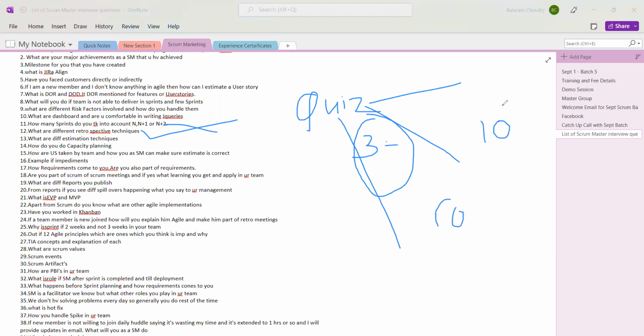The reason being, anything that happens, what did not go well, what went well, and what we can improve, is fresh in mind. If you do it after the sprint finishes, people might forget things about the last sprint. So it is recommended to be conducted immediately on the last day.